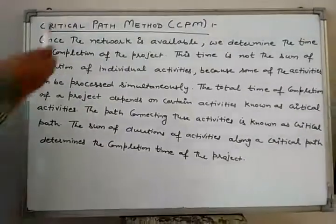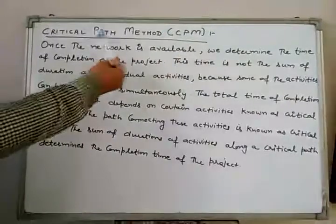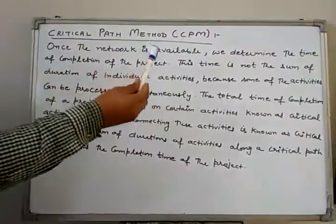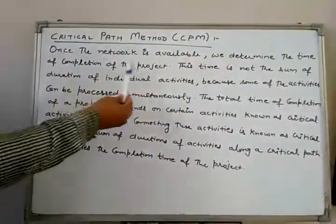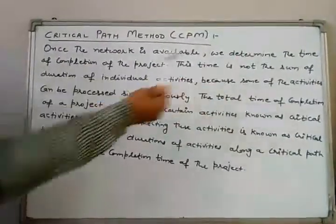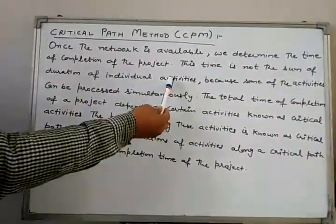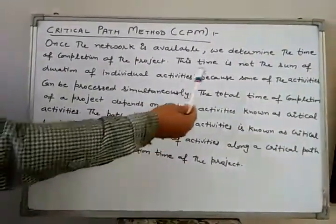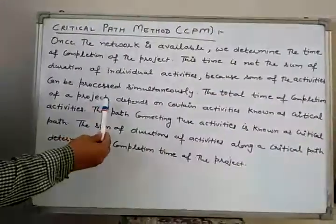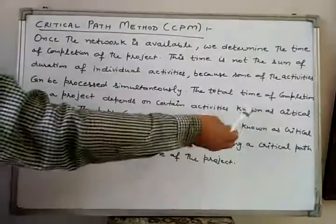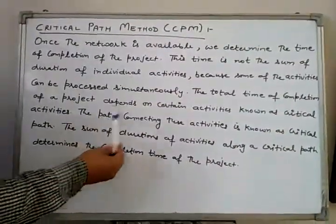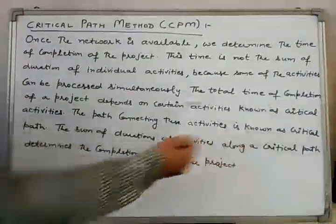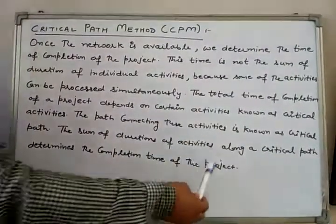I am going to discuss the Critical Path Method, denoted by CPM. Once the network is in our hand, we determine the time of completion of the project. This time is not the sum of the duration of individual activities, because some activities can be processed simultaneously. Thus, the total time of completion depends on certain activities known as critical activities. The path connecting these activities is known as the critical path, and the sum of durations along a critical path determines the project completion time.